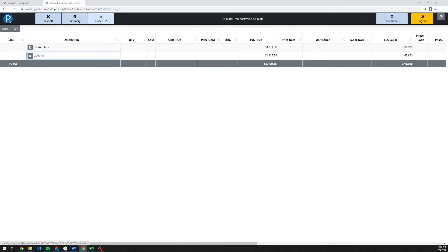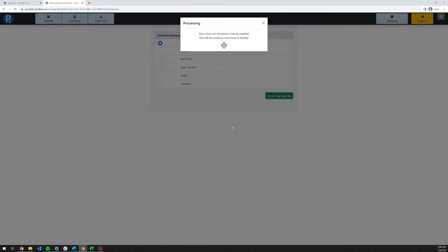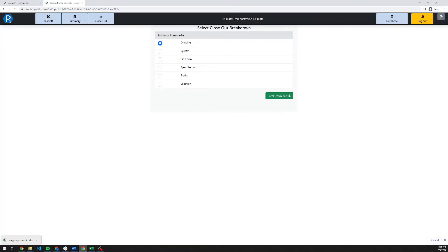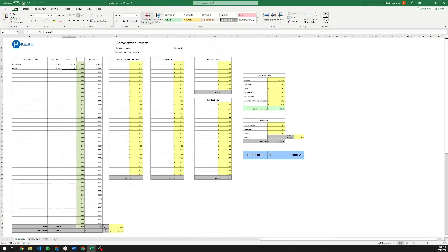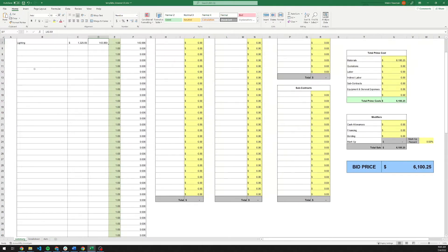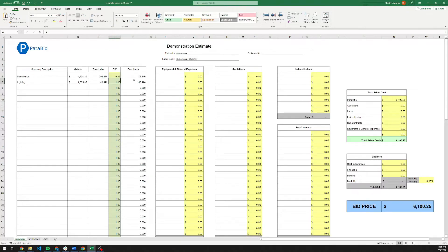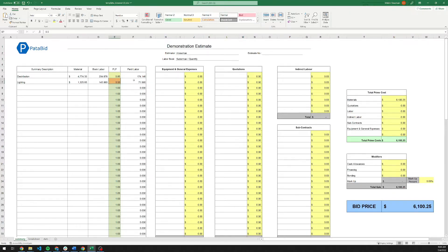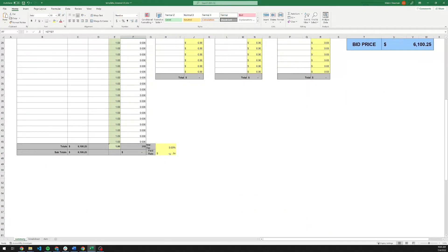Moving on into Closeout. Closeout operates similar to Summary in that you select a breakdown. I'm going to select the drawing and then it generates an Excel template for you. I'm going to hit that Excel button and the system is then going to go and break this down. It has created the template for me. I'm going to click on that to open up the template. In here, you've got your breakdown that you selected. That's your materials, your labor columns for the book value labor. You can then factor this labor if your crew performs better. And then you can set up for your extended field labor.